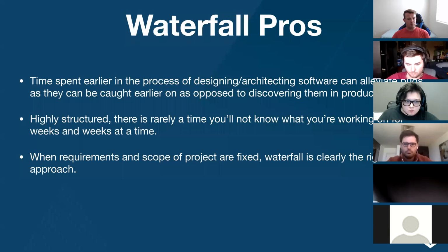When you have the requirements and scope fixed, as they are with waterfall, then waterfall is definitely the right approach. So if you get a project and they say, this will absolutely not change, these are the requirements, this is the scope of the project, then waterfall is a really good way to handle that project.